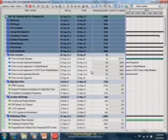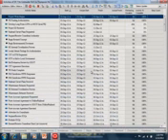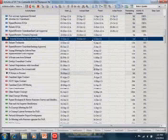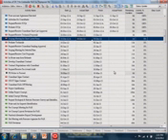All right, so in the Status Update, you notice now I have a column for start, actual start, finish, actual finish, remaining duration, and activity % complete. All right, so if I wanted to update my tasks, I would just pick whatever task was supposed to happen during the time period, double click on it, assign an actual date, right, and then go ahead and click to save the changes.